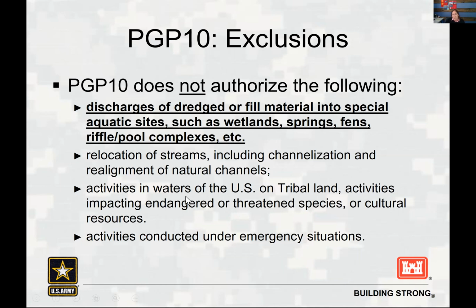Other activities that will not qualify for a GP10 would be relocation of streams, including channelization of natural channels, and then activities that are occurring on tribal lands, or activities that would impact endangered and threatened species or cultural resources. And then activities that are emergency situations would also be excluded from the PGP-10 permit.